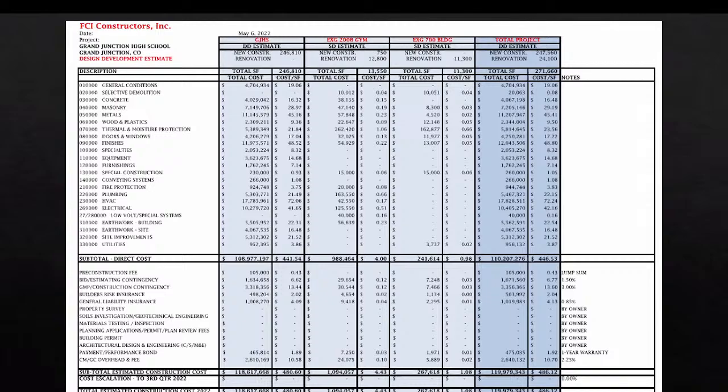As a part of that, we selected our mechanical, plumbing, and electrical subs off of the design development documents. We had a very thorough RFQ process. They submitted their qualifications, past projects, and their team. Then we had an interview process with FCI, the Blythe group, DPM, and our mechanical engineer, who were all part of the interview committee and interviewed their teams. The budget numbers that we received were identical.